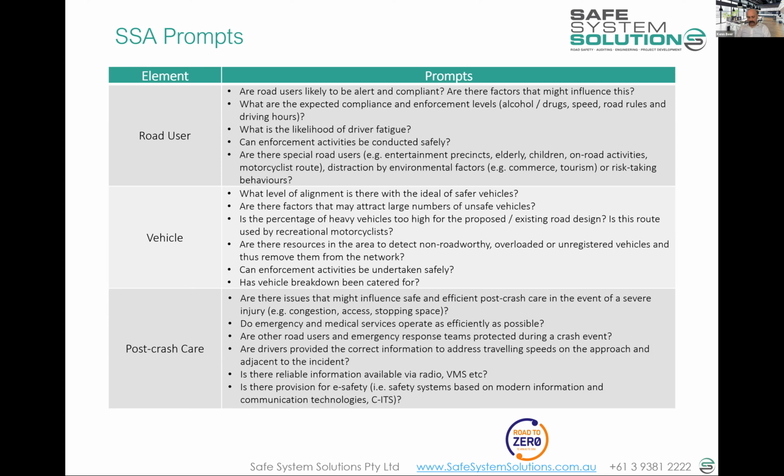Max, any questions or comments? I was actually about to just share an anecdote in the chat, but I might just chat over it. In one example of an SSA, I reviewed a design, and the proposed design actually had a higher score than the existing conditions, indicating that if they were to invest these millions of dollars implementing that particular intervention, they're not going to get an improved road safety benefit. And that should be ringing alarm bells to the project team that they should revisit their design and ensure that they're adopting some of the recommendations.